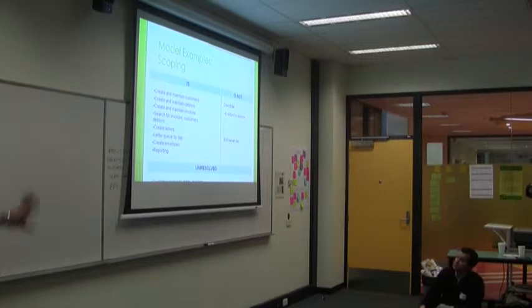This is, as a BA, something I love doing when I didn't understand what the scope of my project was. Simple: in, out, question mark. So really just a list of stuff that is in scope, and it's also important to capture the stuff that is not in scope, because you don't want to be spending time doing that, burning cash, money, and effort. And unresolved is that stuff that people can't make a decision on. You capture it, and at least you've got a placeholder for a discussion later on.